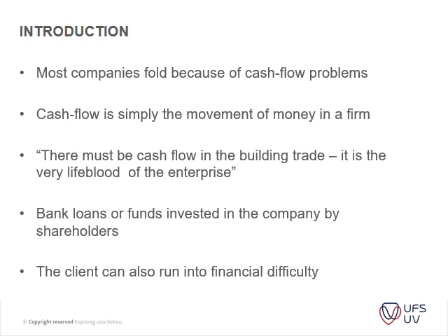The client can also run into financial difficulty, and that's something that one should also consider. So it's always worthwhile to make sure that the client of the contract you've been appointed for actually has the necessary funds available to pay you in the end, and pay you timeously. That's the main thing. Sometimes the client doesn't have money, and then they only pay you after 90 or 120 days, which will have an extra effect on your cash flow.